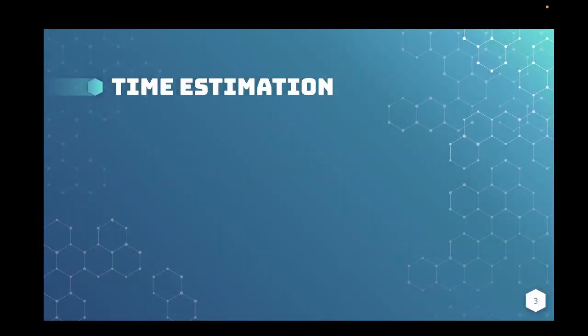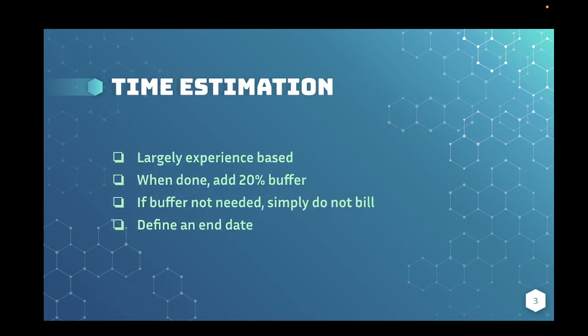Then, when it comes to time estimation, this is largely based on the experience of a tester. This will often be a very high level estimation, and when you're done creating your estimation, usually you add a 20% buffer, and when a tester is a bit more experienced, he can look back at previous projects as well, at his mailbox, at reports that he's written before, test plans.